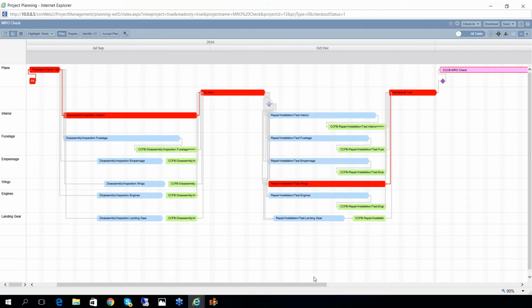What you will see is the critical path is comprised of only 5 tasks. And by definition, this critical path is going to be very stable. And because this critical path is stable, the priorities that you're going to get on a day-to-day basis are going to be stable. And stable priorities, by the way, are important if you want to reduce the amount of multitasking in your organization.